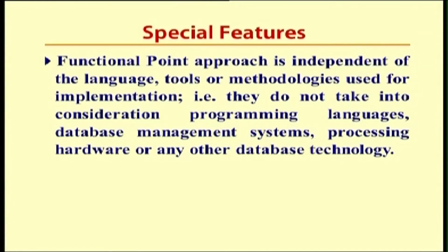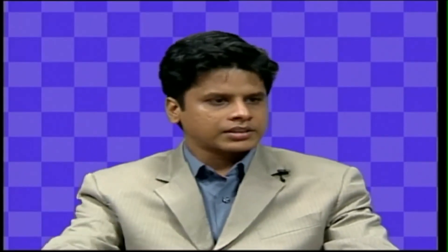Function point analysis has special features: it is independent of the language, tools, or methodologies used for implementation. Instead of using lines of code, we use the five parameters — external input, external output, external inquiries, internal logic files, and external interface files. They do not take into consideration programming languages, database management systems, processing hardware, or any other database technology.